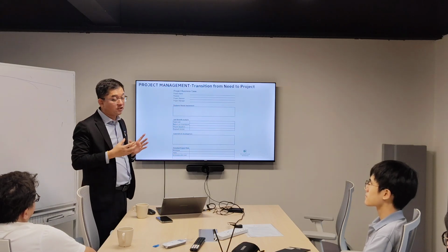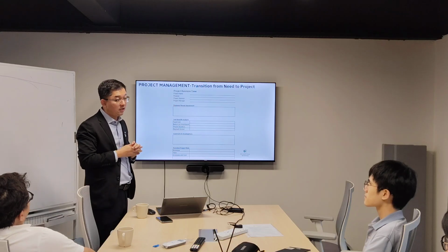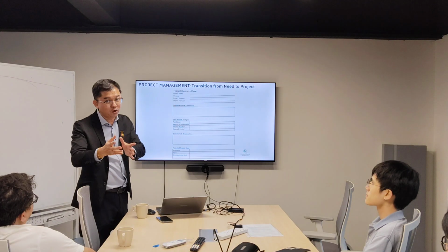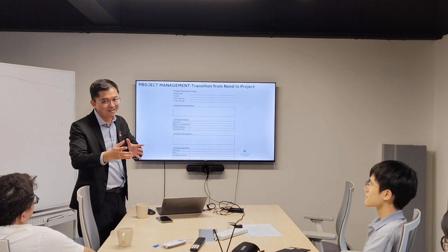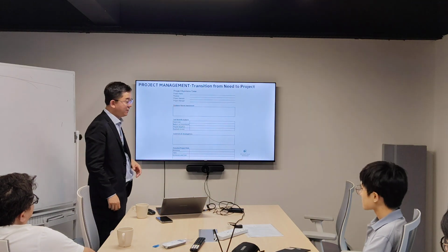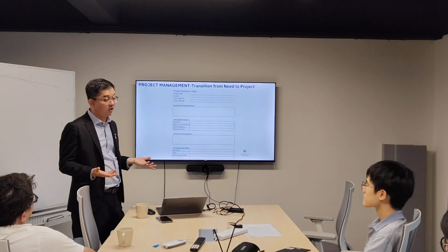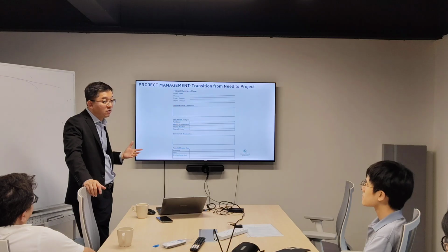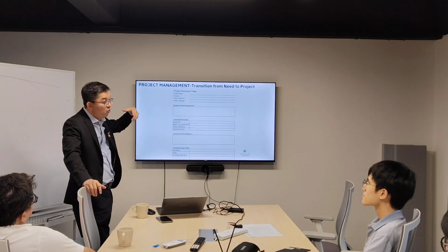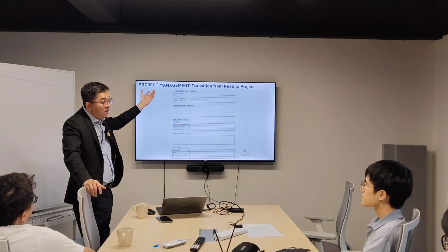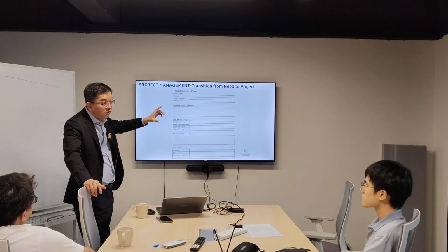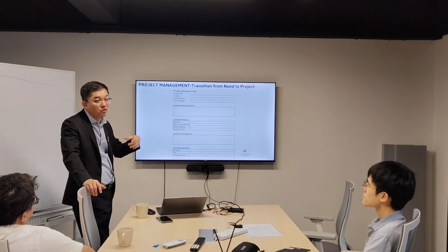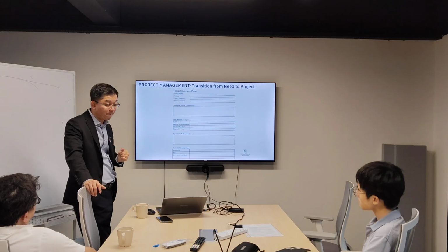You may face the risk of fewer resources. The reason is that all the people go to Singapore because of the three times currency rate. That's the risk of the resources. Maybe when you list out all the risks, you can have the approach. Like we go back to that. Okay, the financial, the budget, you need to increase your budget already. So your selling price of the house needs to increase already. Correct? Okay.